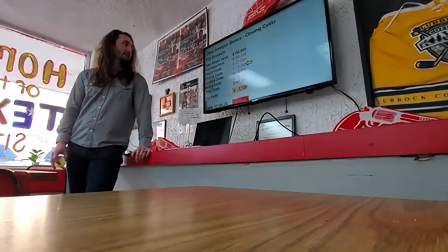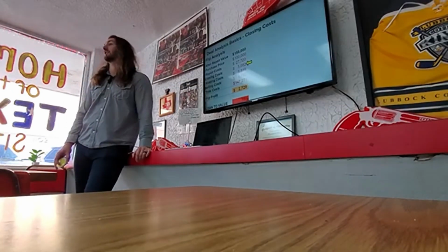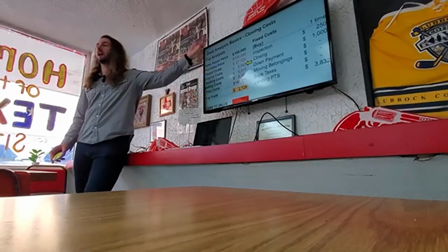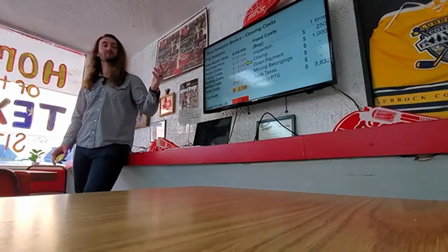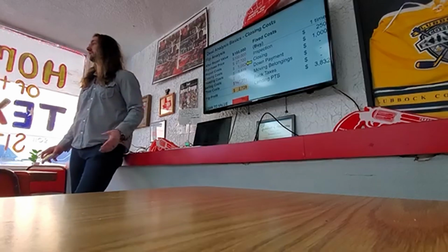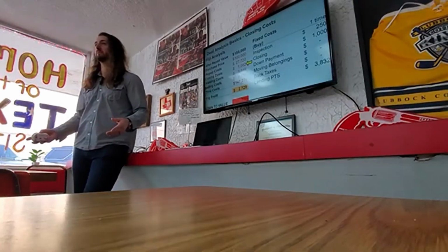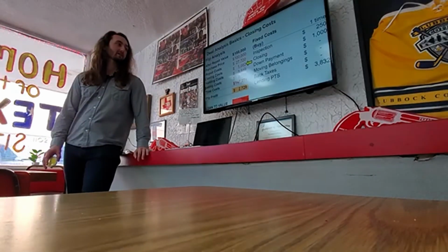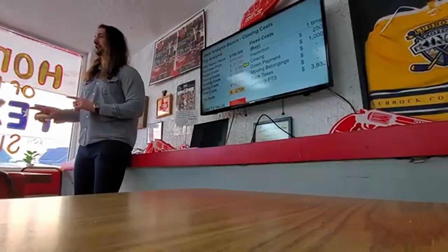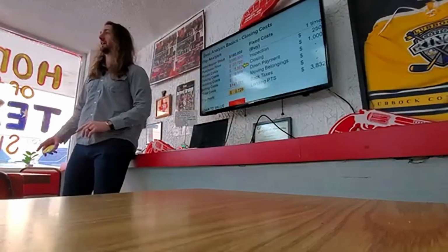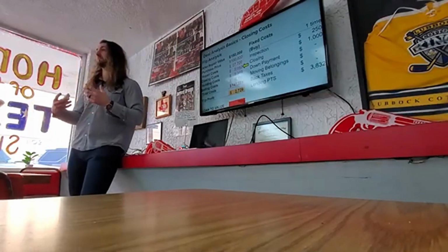Very important. Next, let's look at the closing costs, $5,000. That's $5,000 less profit than you thought you were gonna get. This is just some closing costs of $1,000, $250 for an inspection, and then your lender's points. And this one I had 3 points. If you go to a hard money lender, you're probably gonna pay 2 to 3 points. All of these things are typically paid at closing, cash out of pocket. And so that's $5,000 right there that you didn't think about. If you are your own lender, you just pay true cash for everything, then you don't have that cost. Like I said, this is based on my model.